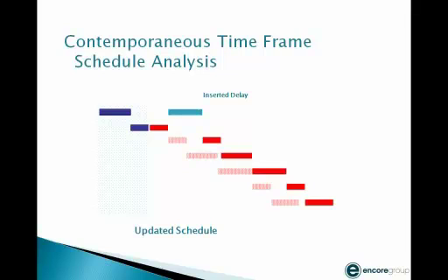What you have to be careful of is that a contractor might just add duration to their schedule, once again, to meet that contract date so he doesn't get the change order, and then as an owner, you end up with a schedule that is not accurate. It's not really how the contractor plans to do the work. So once again, that's probably the best scenario that I've seen, is to just add a change order that says we're going to change the completion date.